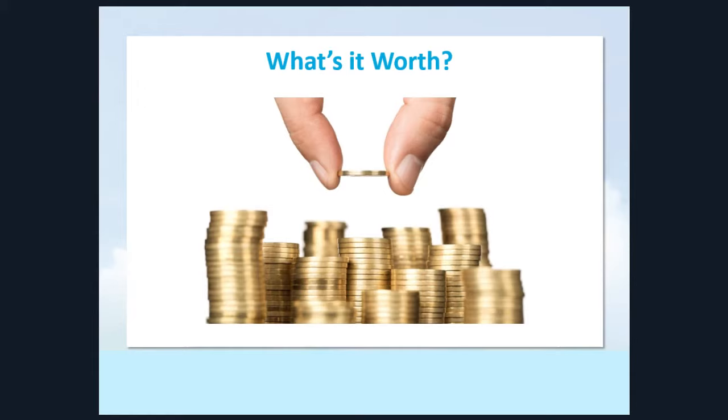What I mean is, if a change that you want to have outcome is worth $1, then you clearly can't spend more than $1 or it's not worth it. In many cases, you need to spend less than $1 to make it worth it. So you need to define that as part of the outcome. What is the value of this change? What is the productivity gain? What is the market penetration? What is the additional revenue? Understanding that is going to allow you to prescribe what you need to do and how much you need to spend to achieve that.